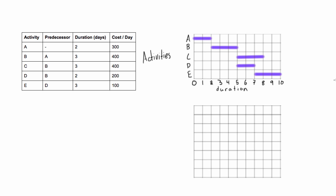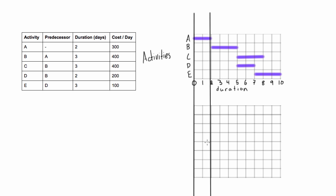When drawing project S curves, the best way is to split up your Gantt chart into a series of periods. These periods are defined by the points where any activity starts or ends. We'll draw vertical lines at those points. The graph for the S curve will be drawn below — stacking them makes everything much easier to manage.